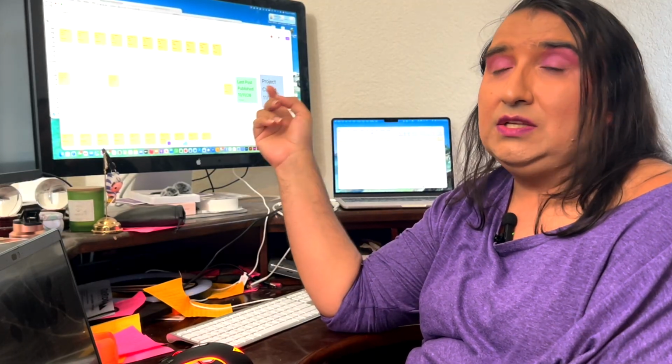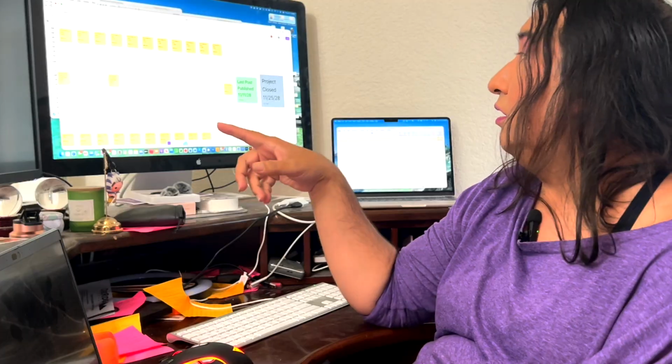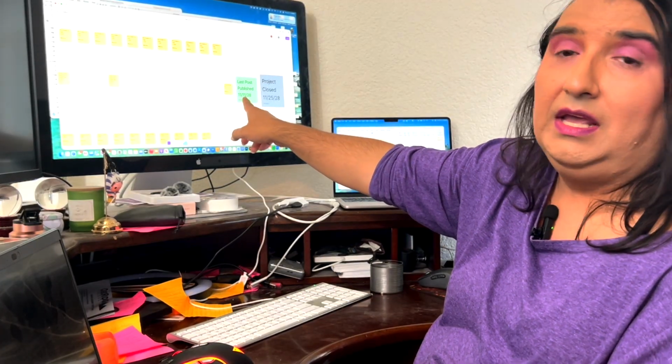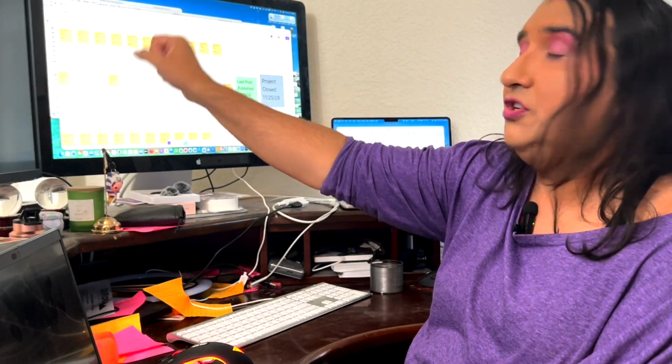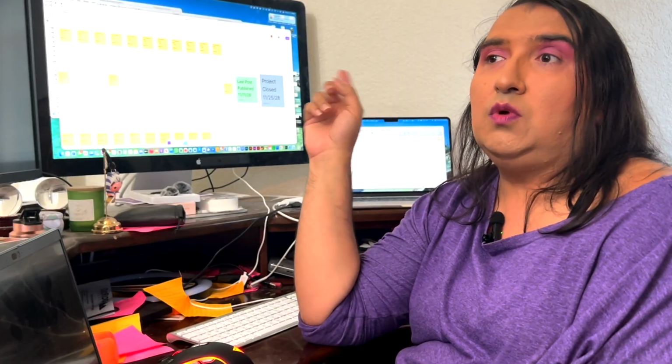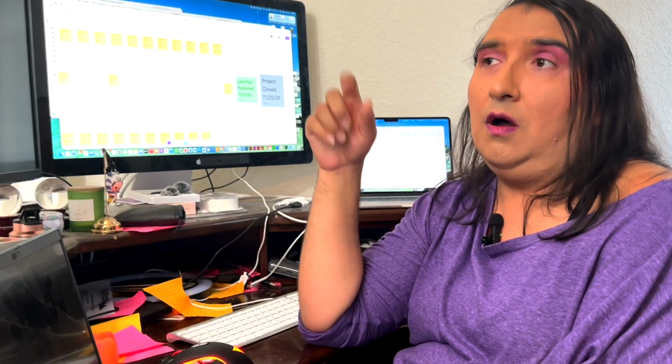Now what we're going to do is go backwards. So we're going to start with this last post published date, and we're going to fill in the late finish field, and then go forward from there. So you'll see here where it says late finish and then late start. We're basically going to do what we did with those days and count backwards all the way to the beginning of the project.